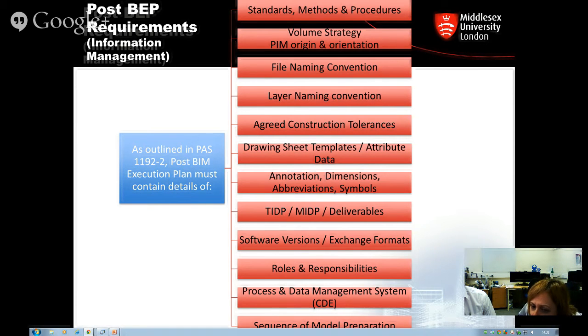Yeah, space phasing. Lee, when clients are not familiar with the EIR, how will they be able to complete this form for a project at the correct time? At the moment, it needs a little bit of pushing from the consultant, from the people on the team, the design build contractor, whoever is in contact with the client when they come to sign up. There is a little bit of pushing or explaining that might be involved to inform the client and get him on board with it and create it. Otherwise, it's you guys who will suffer in the end if the client does not have a clear EIR from the beginning to follow. He might ask for things which were not expected later on and just say that it wasn't there.